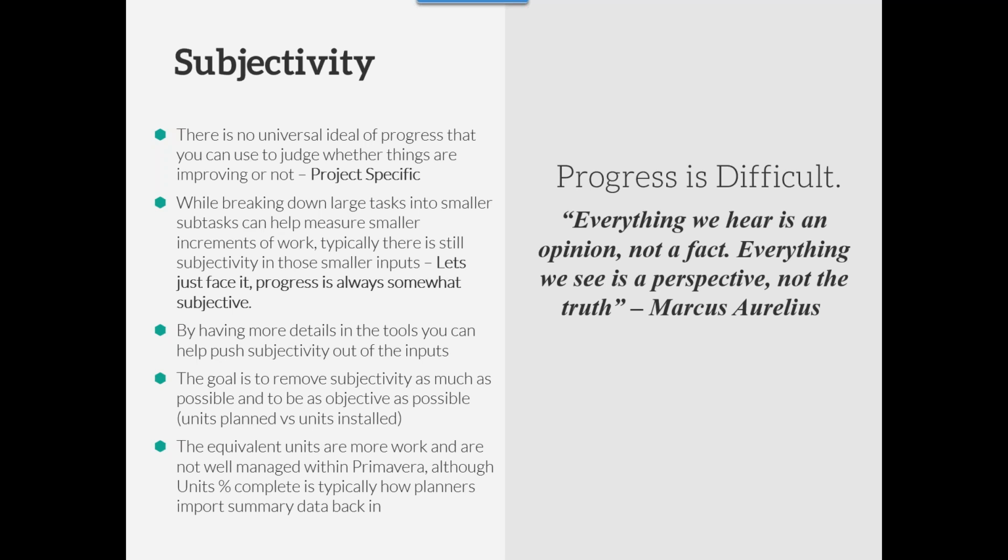The goal, at the end of the day, for both the contractor and the owner's team, is to really remove the subjectivity as much as possible. And really getting down to units planned versus units installed continues, at least through the lens and the experience that I have, to be probably the best way to do that. And the equivalent units are more work.